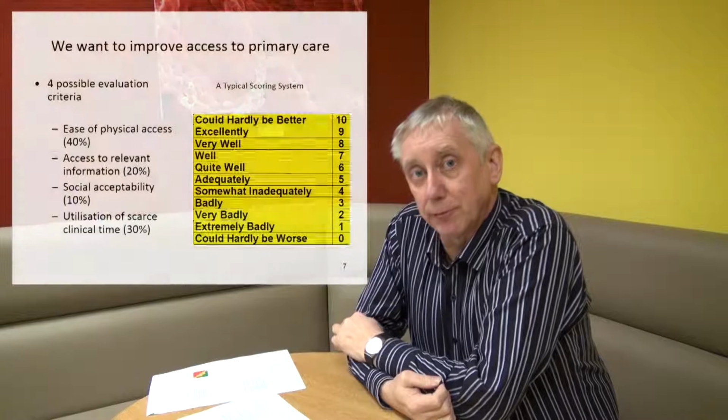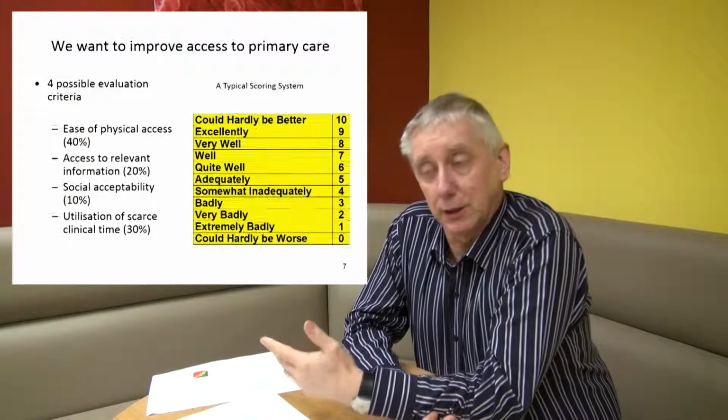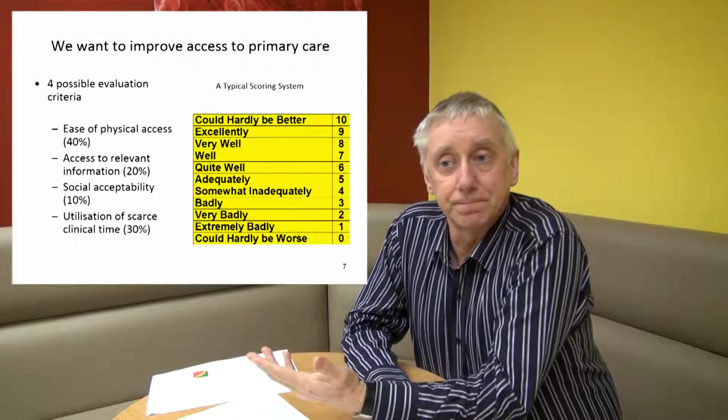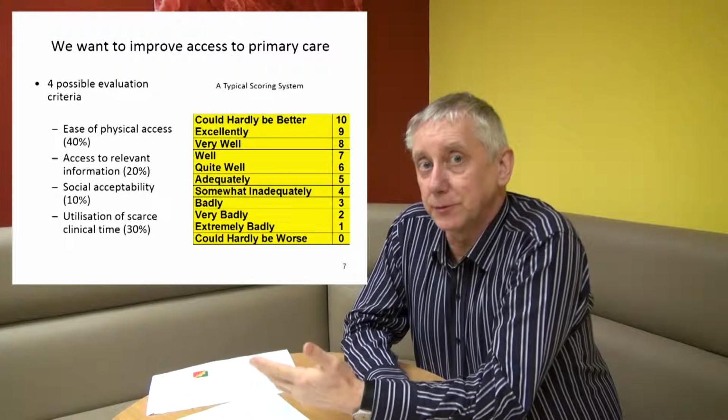And having done that, although it sounds like quite a soulless process, once you've done that, you would be hard pushed to then say, well, that's what the figures say, but we actually think there's a better proposal. The key is to make sure the criteria are designed and agreed upon before you start generating options. So to take a simple example, if I wanted to improve access by vulnerable sections of the community to primary care, I wouldn't start listing the ways of doing that.